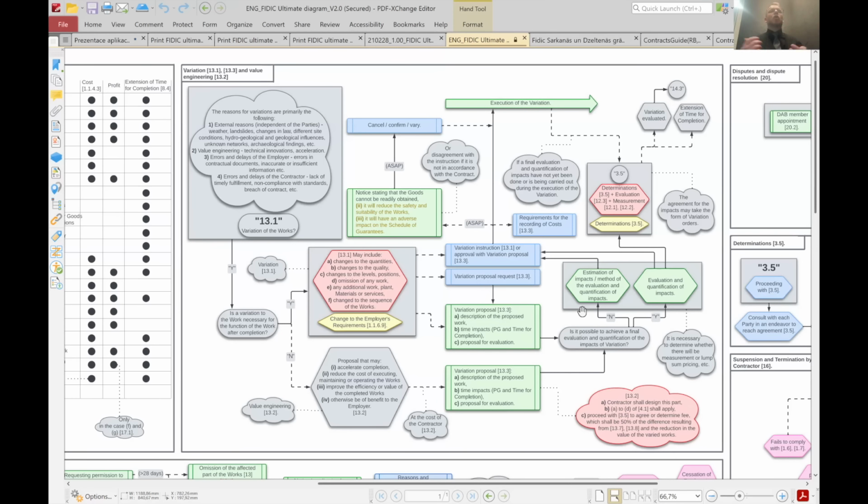There are always some conditions that are unforeseeable. There still will be some mistakes in a detailed plan of the work. So there is always a possibility that I will have to change a few technical things on the work during the construction project. That's what the variation is for: when I'm changing something that was planned ahead, during the construction project.